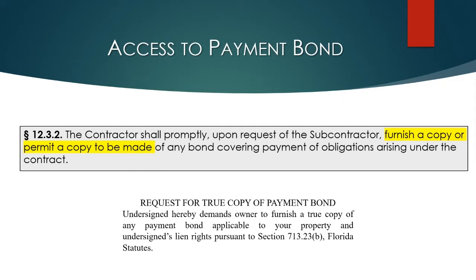Also want to point out a good practice pointer in your notice to owner, notice to contractor, that you should be serving on just about every project. This Florida statute allows you to request a copy of the bond in that notice. And so, in our standard notices, we include that bond request. And we do that because then, if you're serving this on the owner and the general contractor, if they fail to provide you with a copy of the bond, the statute will make them liable for any damages that you suffer due to that failure.